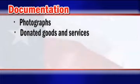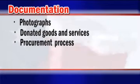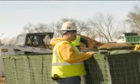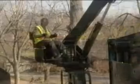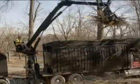When managing contract services, the applicant should keep documentation concerning the procurement process. This should include how and why a particular contractor was selected, as well as copies of contracts and invoices. In addition, primary contractors must be able to provide the applicant with copies of contractors' timesheets and equipment records.